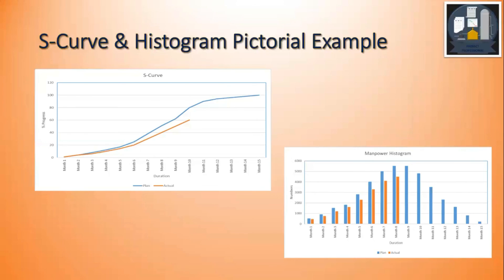On the right-hand side we have the manpower histogram. On the X-axis is the timeline in months, and on the Y-axis are the man hours. The blue represents the planned man hours from the baseline, and the orange represents the actual man hours spent. As we can see, the orange is less than the blue, meaning the actual man hours deployed are less than planned — and that may be the reason for the detailed engineering being behind schedule.